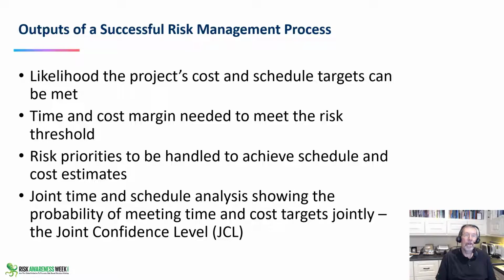It does show that we can make the launch date 4 years from now at the launch site in Northern California at Vandenberg Air Force Base. But when I run my Monte-Carlo simulation for the naturally occurring variances in the duration, it shows I'm 11 months late. I only have an 80% chance 11 months from now. So we need a new schedule.